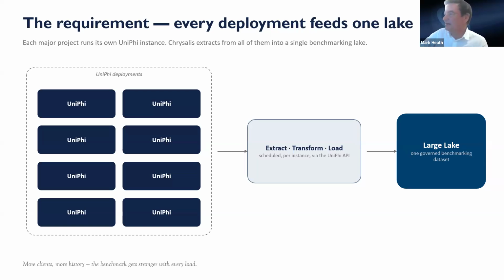In addition to that, we will start to build new transformation engines that are broader than just the UniClass model. The next one on the chopping block is cost breakdown structures for quantity surveying type use cases. So globally, there's numerous standards. There's not one standard for capturing costs on a project, and typically before construction, they'll be called elemental standards, but there's more than one of those. And people don't necessarily even build their estimates to those standards anyway. And then at tender, you'll get a tendered price against trades. And this transformation engine will reclassify all of that data into a standard that you've chosen for your business.